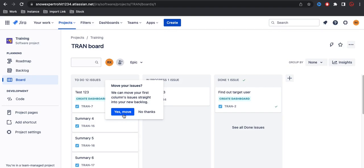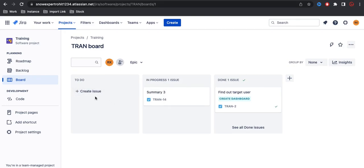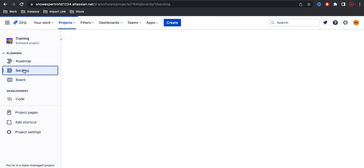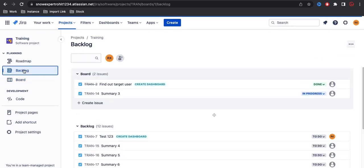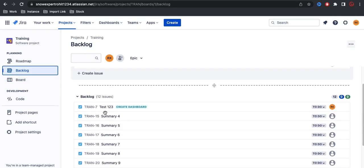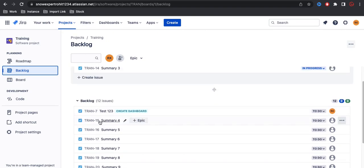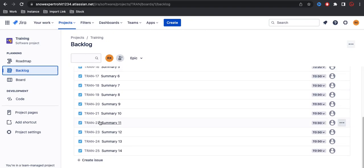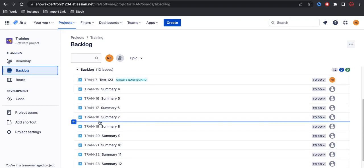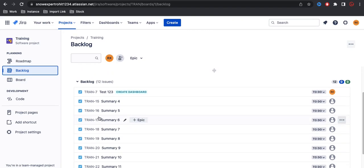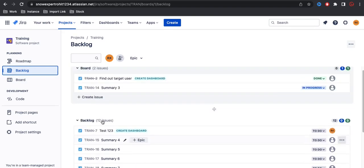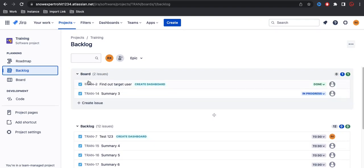It says we can move the first column's issues straight into the new backlog. If you click 'Yes, move', all the stories will be moved to the backlog. I'll click 'Yes, move' and you can see all the stories in my first column are now moved to the backlog. If I go to the backlog, under this backlog you can see all the stories and tasks are present, and from the backlog we can move them to the sprint or to the board.